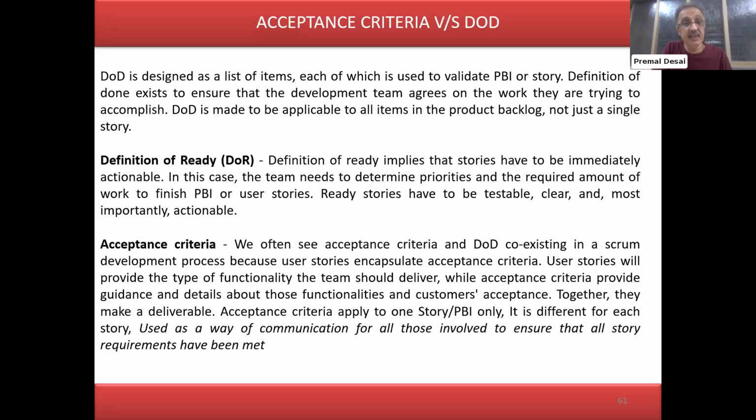Definition of ready, DOR. Definition of ready implies that stories have to be immediately actionable. In this case, definition of ready is: story needs to be elicited, written down, prioritized, and given story points. That is where the story is complete enough to commence the design and development. That is what we call definition of ready, DOR.